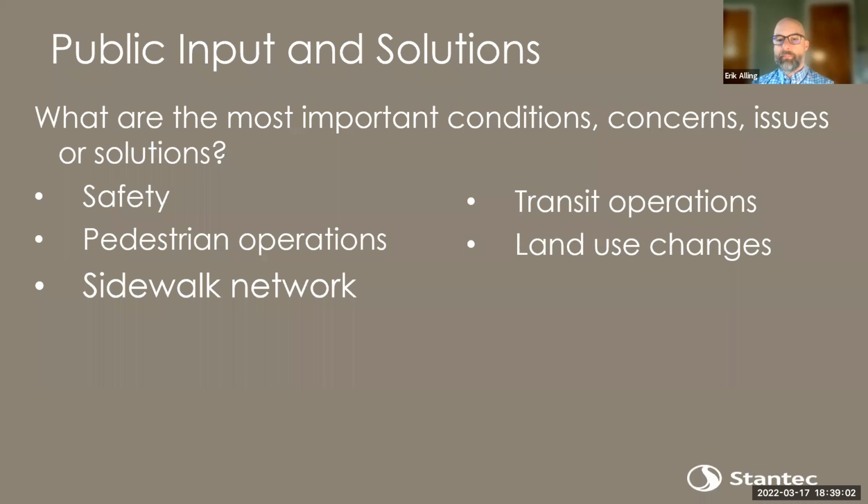Yeah, so there's provisions you can put in the contract that require an archaeologist to be present when the work is happening there. There are procedures that can be added to any construction documents that dictate that the contractor can't just go in there with an excavator and start digging. There'd have to be an archaeologist involved. And we have done work near cemeteries in the past, and you just include those provisions in the contract to make sure it's done properly. Okay, thank you. You're welcome. Thank you. That's a great heads up.